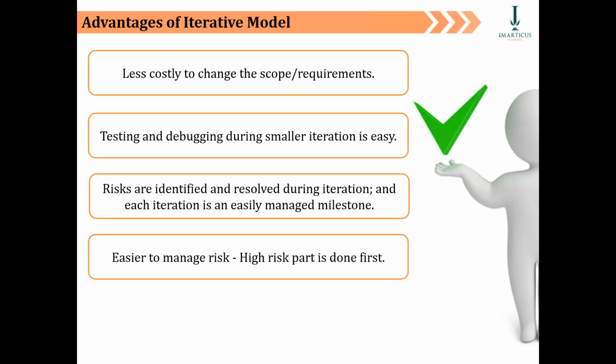Advantages of iterative. Well, it's less costly to change the scope. Because in a waterfall, if you change the scope, a long list of design changes, configuration changes, and all that happen. Something which you accomplished in the last 2 months suddenly undergoes a big change. In iterative, it doesn't, because you've been checking if your smaller changes are undergoing any further change from the business side. If they were, you kept tweaking it. So even if a large change happens, because you have already broken that down into smaller parts, it doesn't hurt you. That's why it's less expensive.